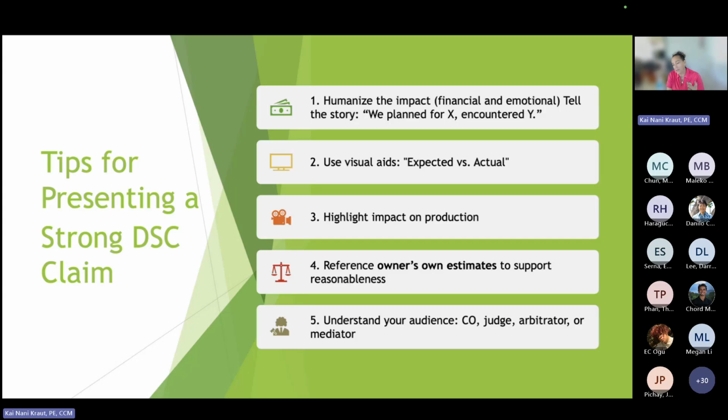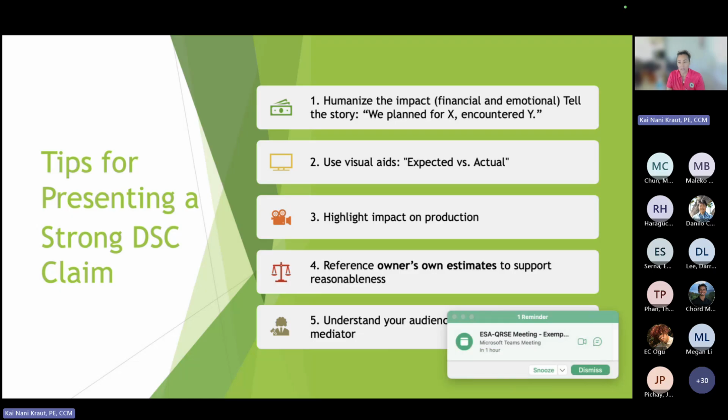Now, the contractor doesn't have this, and I'm not sure if we put this, it's probably going to be in the follow-on, but Cord just mentioned it. One way to look at these analyses is: what were the other bids? If you look at the bids and everybody's bid is kind of in the same realm and it matches the engineer's bid, that's one way to evaluate if it was materially different.